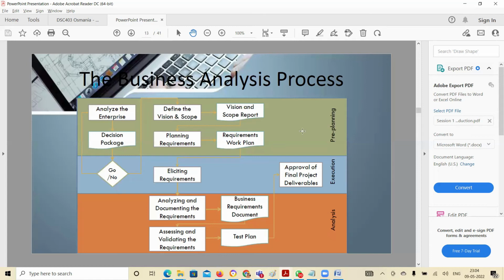But if you talk about, say, a payroll problem, let's say your employees have a problem with the payroll, so now handling payroll is out of scope, because that's not going to improve your customer satisfaction score. Yes, that is also a problem. So maybe you can have a parallel project, or next year you might look at it. But your focus right now is to improve the customer satisfaction score. That's where you have to focus. Working on something else is out of scope. So you talk about what is in scope and what is not in scope.